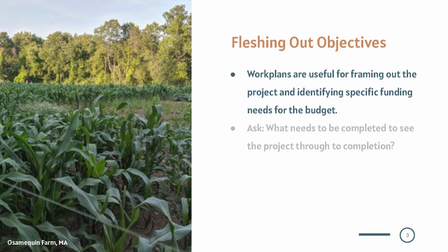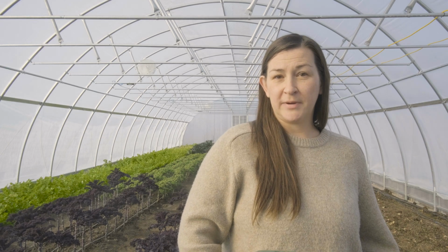To create a work plan, you will build on your objectives, which we talked about in Module 2, by breaking them down into actionable steps or activities. You'll think through what is needed to complete the project successfully, and for each objective, ask yourself, what needs to be done? What are the markers that indicate the action steps are meeting the objectives? This is often referred to as milestones. Who will do it? How will partners be involved? How much money is needed? What are the expected outcomes?